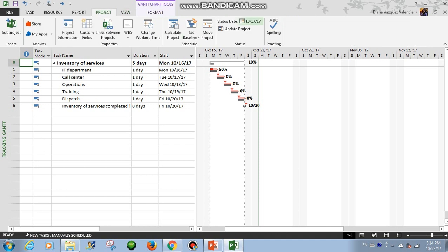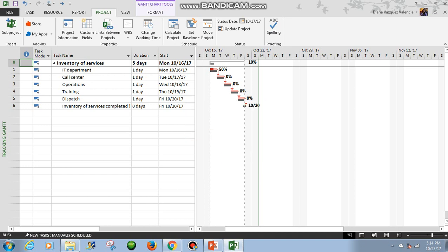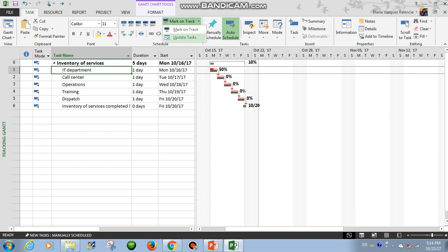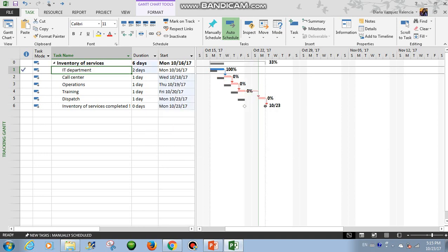Okay, let's put some other values to keep tracking. So we have to go back here. Let's suppose that today is Wednesday. So Wednesday 18. Okay. So we will say that yesterday we completed the call center. So finish on Tuesday. We completed the IT department 100%. Okay, now you can see here it's showing that we took 1 day more.